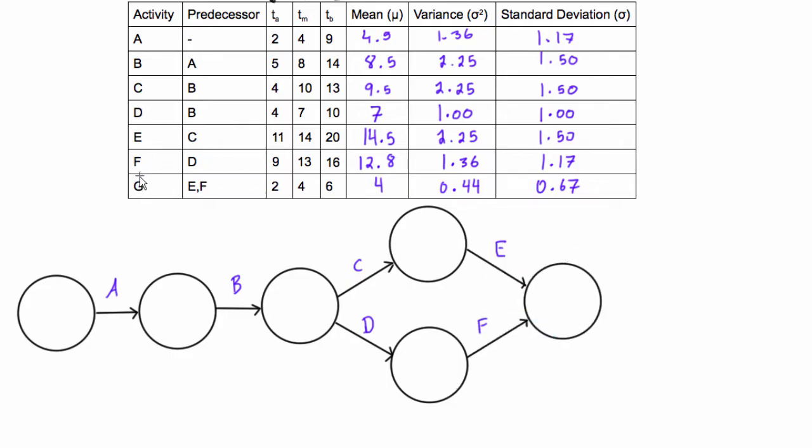So then we can put in activity G coming right off of this, depending on E and F, and we can finish off the network diagram. The last thing we need to do for a CPM network diagram is just come through and label all of the nodes so that each arrow points from a lower number to a higher number. So we get 1, 2, 3, 4, 5, 6, and then we'd finish off with 7.